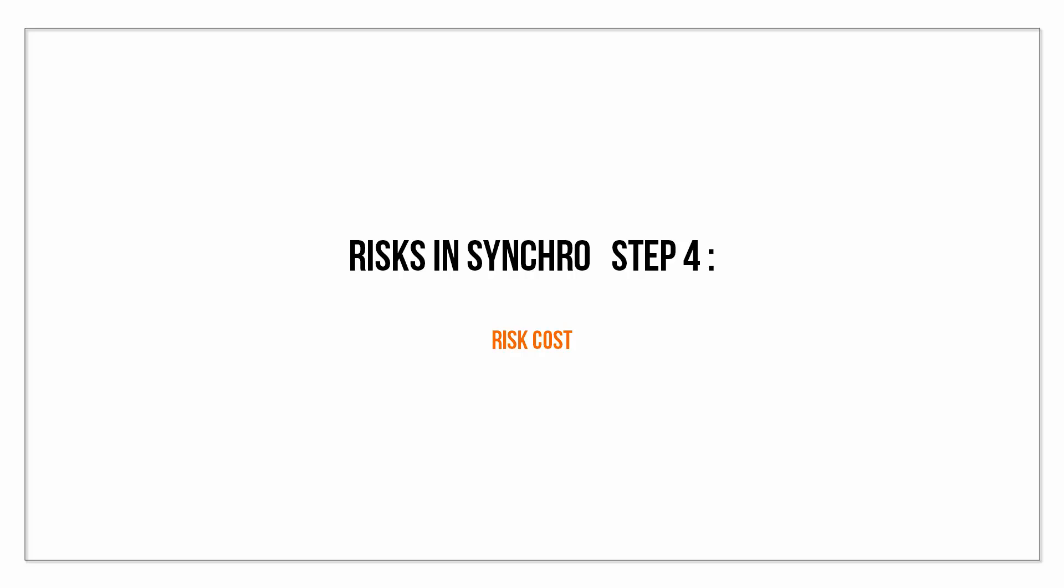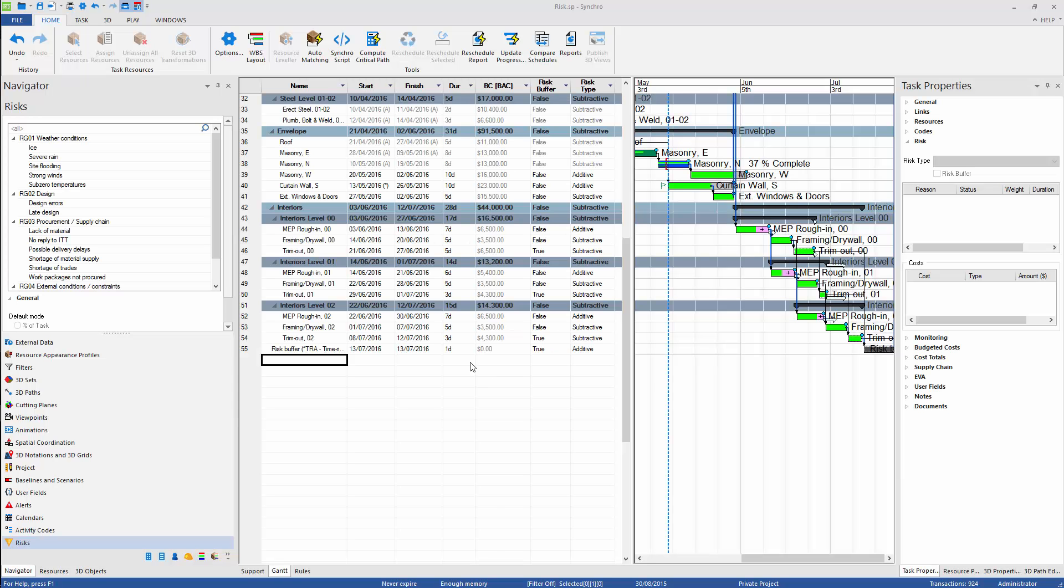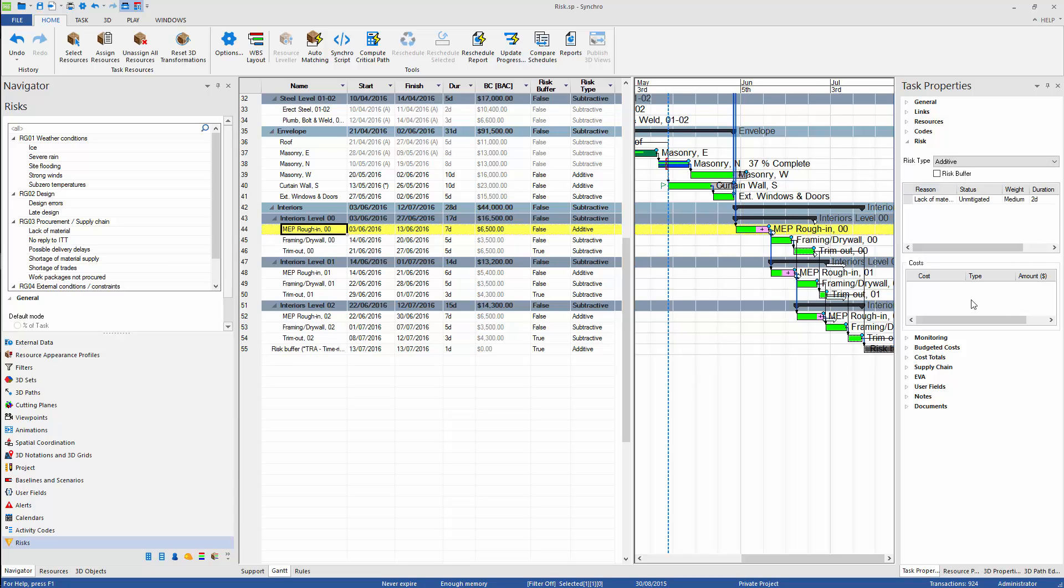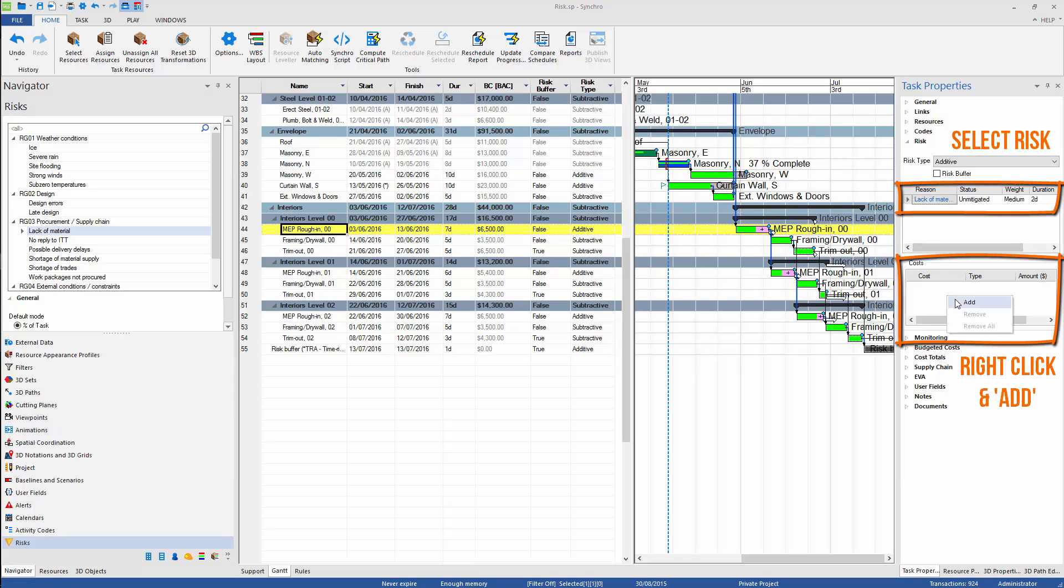As mentioned before, risk can affect both time and cost. We can add cost to each identified risk. To do so, we need to go back to our identified risks, select the risk, and simply add the cost the same way as we add the cost to resource assignments.